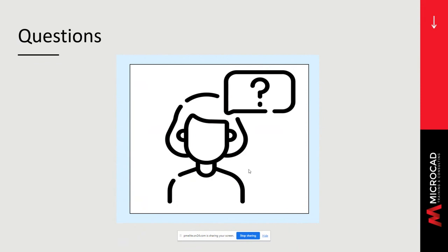That's a really good question, and it depends on how you set up your project. Many organizations set it up so that you have two kinds of issues: local to one design team, and issues that are public. So if the design team has a question or a concern that's really in their bailiwick and they don't want to share that with anyone else, they can create and resolve those issues themselves independent of the rest of the team. Or they could make them public and make them available to everyone.